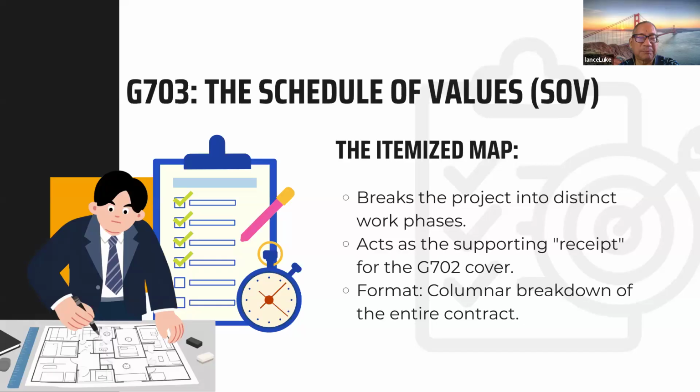Okay, so that could be a small percentage of the entire foundation amount. So let's say the foundation concrete slab costs $50,000. So the contractor may bill $10,000 for grading to get the lot level and for form work, right? And then the form work could include installation of rebar and everything to get ready for the concrete pour.